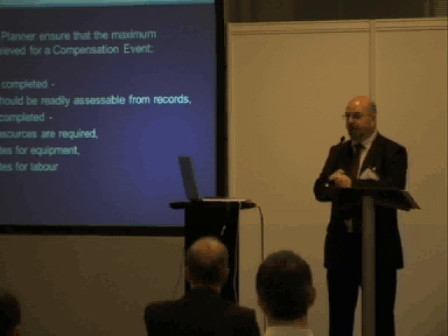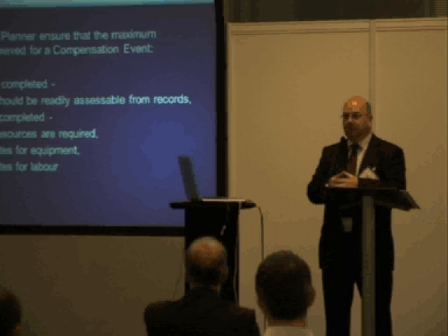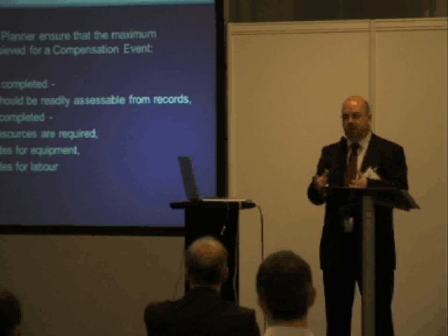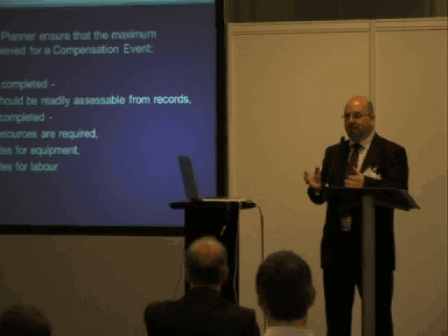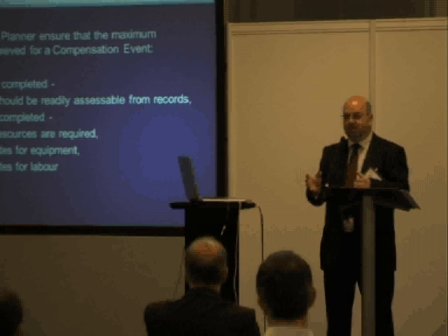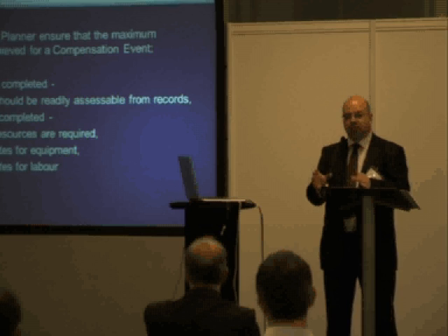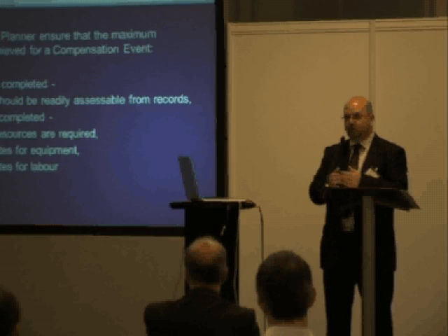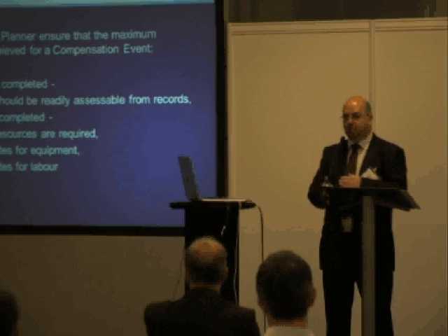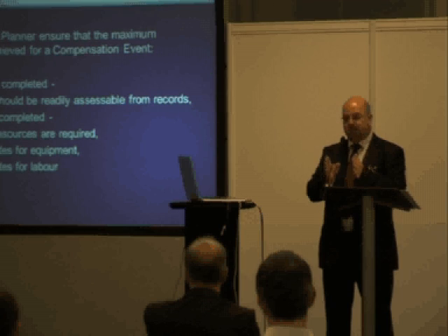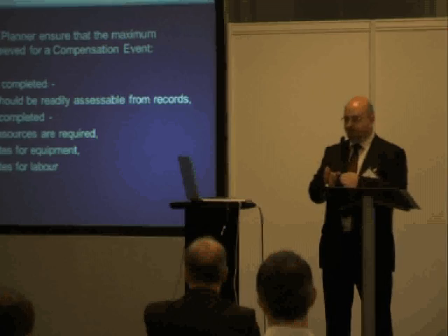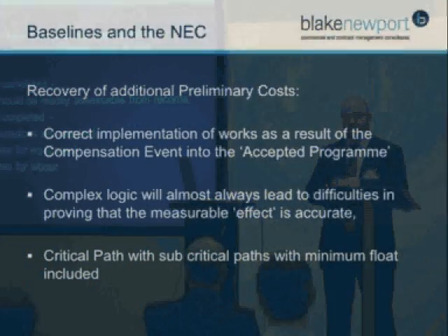Something that is always useful: how much time do we lose as a result of briefing the operatives? If you've got 60 to 70 guys on site and you've got to get them all together, marshal them into a room, speak to them for half an hour about a change in the site, that's a significant loss in terms of productivity. So if you've got your weekly briefing, clearly there's going to be toolbox talks and other aspects to do with briefing, but if there is a briefing that's required as a result of change, that is a real gem to be able to earn some money on.